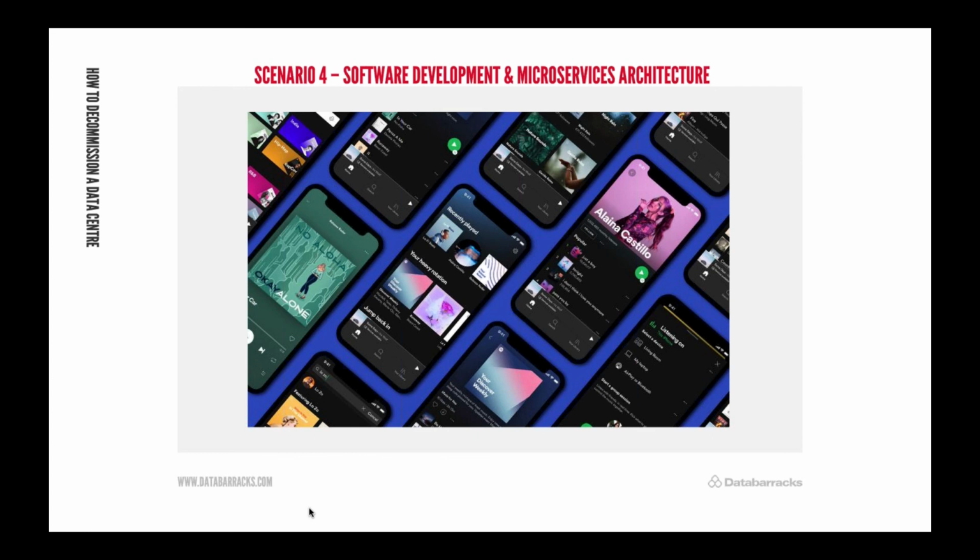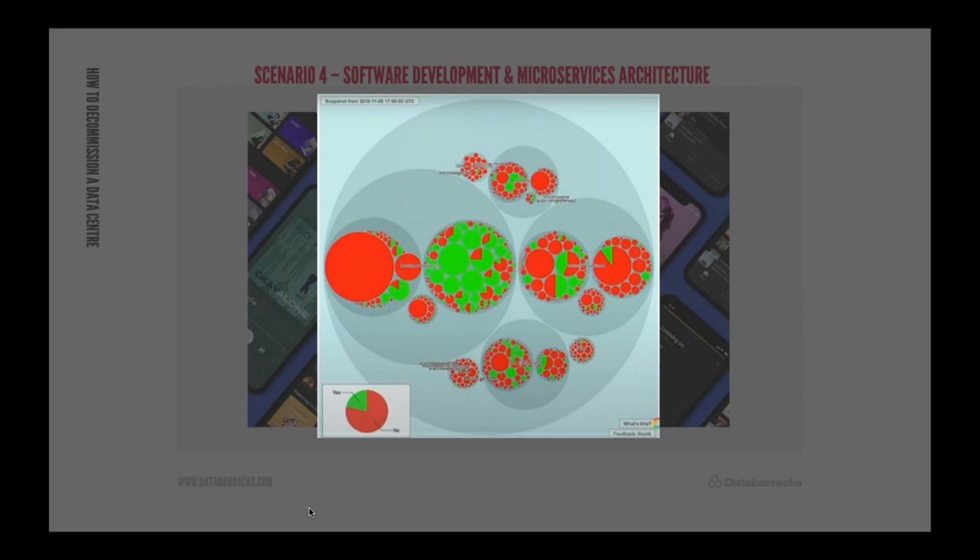But the one thing that I think is the best simple takeaway from this that hopefully everyone will be able to use: they created this visualization on screen as an indicator of where they were in the project. The red bubbles are systems that were still on premises. The green bubbles were things that have been migrated. And I think this is amazing because if you think of the amount of time that a project manager during a project like this would spend updating people, trying to give people a sense of where you were in the project, this at a glance, you can tell exactly where everything is.